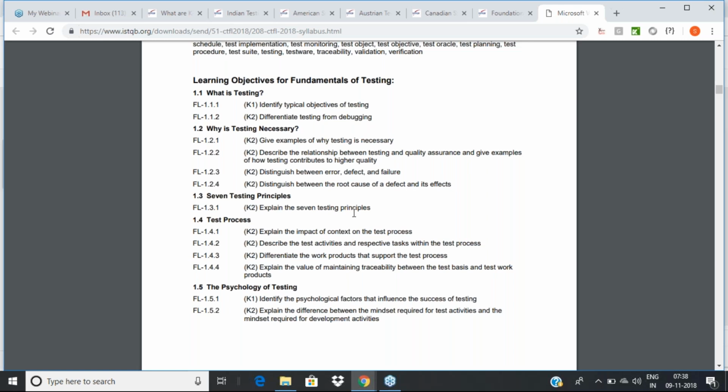And from the testing side, I was in charge for my project, because unless every project follows those principles, the company cannot get a certification. So what will happen there is every project has to follow the standards, and the auditors will come from the CMM, auditors will come from the Six Sigma, auditors will come from an ISO. They will randomly pick some 2 or 3 projects out of, say, 20 projects going on in an organization, and ask questions. There will be some good 150 plus questions, and every question needs a proof for them.